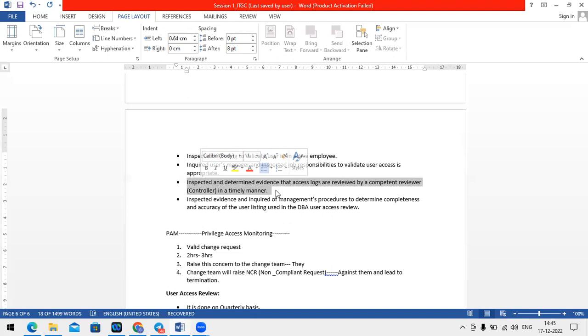Other than the change management, will this high privileged access still come into the picture? Yes, because change management's responsibility is just to ensure that, from a documentation perspective, everything is fine. Second, from a risk assessment perspective, if somebody has logged a low risk change, they need to understand whether that is really a low risk change or a medium risk change, because they will give you the reason why this is a low risk change.